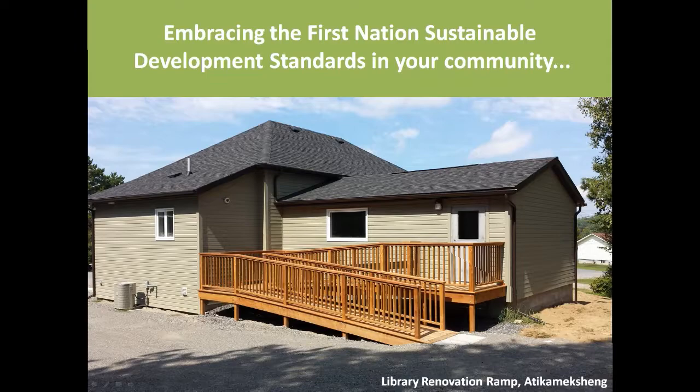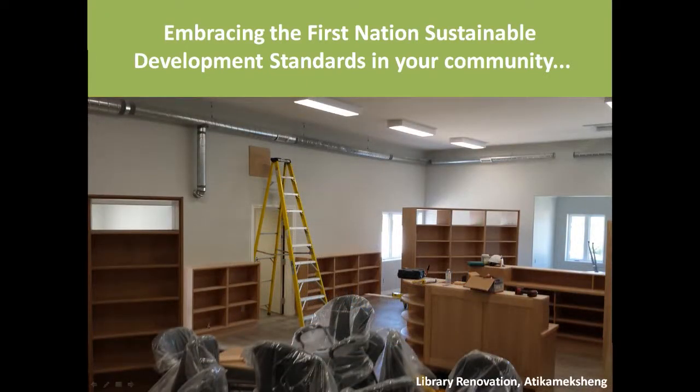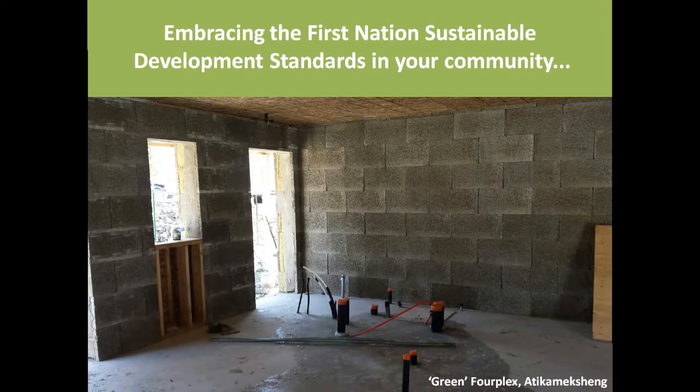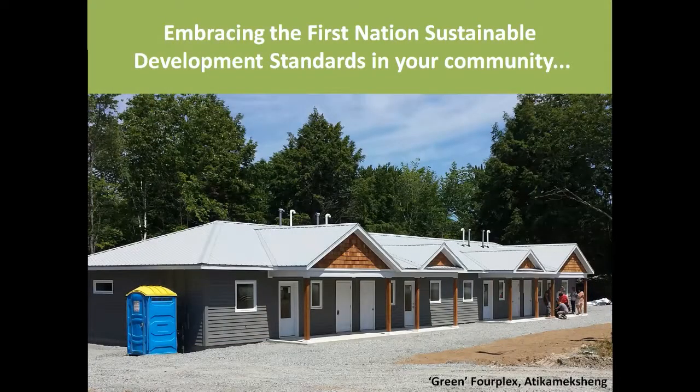We completed the fourplex as part of the 7-unit project. Those are the 1-bedroom units, and those were completed relatively on time. However, at the same time, we had the same contractors completing our library renovation, so both projects were a little delayed because of that. I don't think they had enough manpower to take care of both the fourplex and our library renovation at the same time. So that's something to consider as well when you're hiring your contractors. This is the fourplex right here.